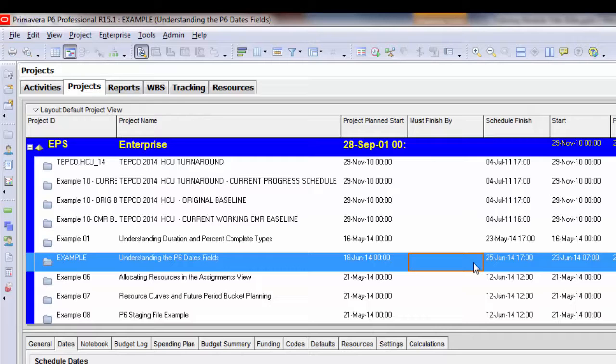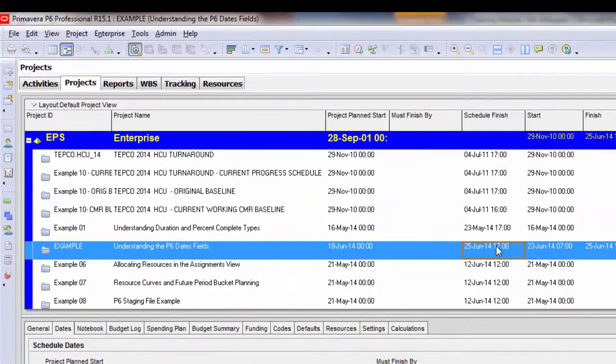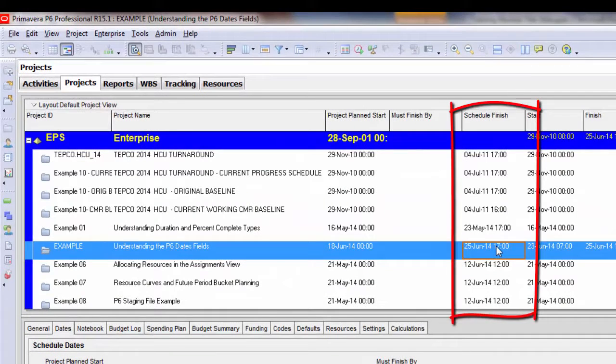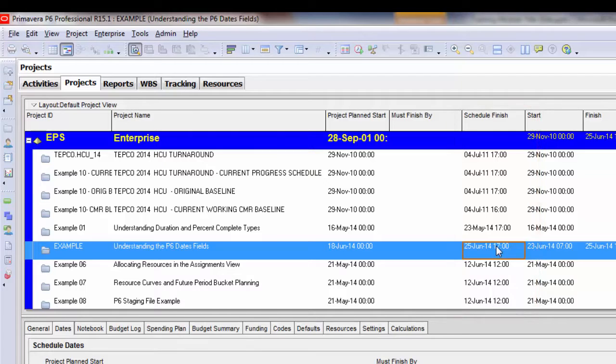If we follow the general definition of a project where we have a defined start and a defined finish, it's good to set up a start milestone for your project and a finish milestone for the project and then manage the constraints off of that. All of your activities should eventually, through the activity networks, feed into that final finish milestone so you can call the project complete. The schedule finish field defines the early finish date of the last activity in your schedule. So if you do have a finish milestone in your schedule, this should match that finish milestone.